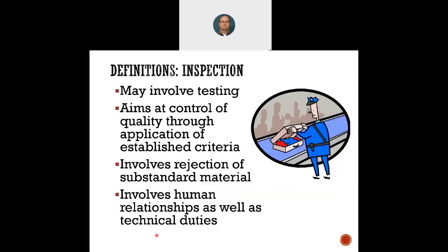Hey, this gradation was close to failing. So maybe you want to check on that, right? So we can help them. To help them, one is give a good quality product to the owner and the engineer, right? And to help them so they can catch it early enough so they're not getting deducted in pay because their tests are failing. So you want to have that relationship, but you got to be firm, though. Okay, you got to be firm.